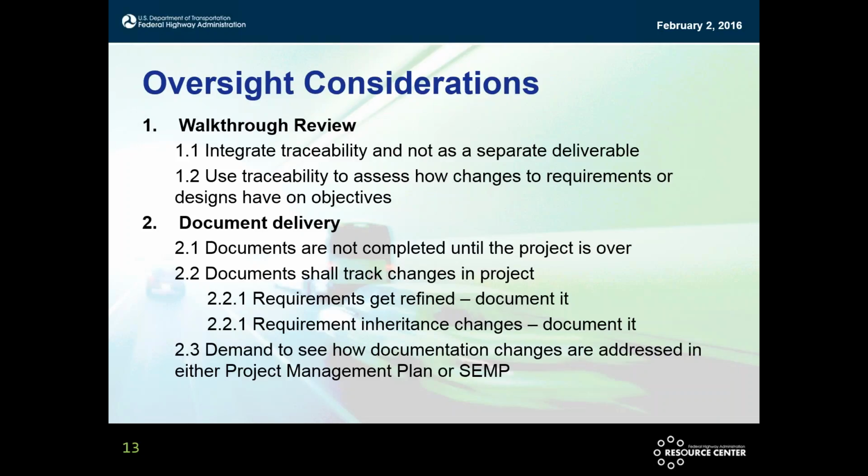Don't accept any document for the project, because if they are iterative or spiral type development, you expect those documents to change. Have them deliver to you a new set every single micro iteration? That's non-productive. But have access to whatever they're using to track the changes that have happened. If they don't have that, that's a problem.